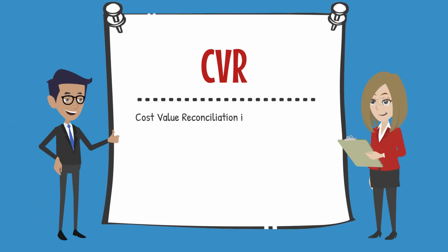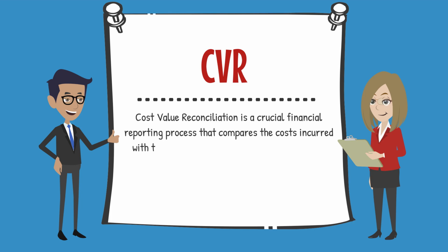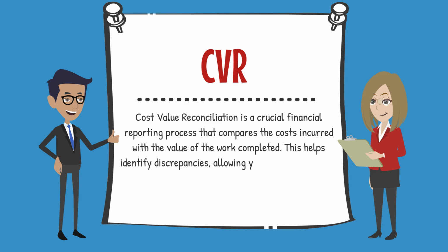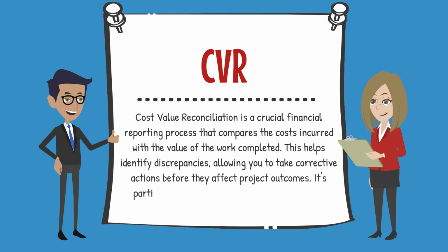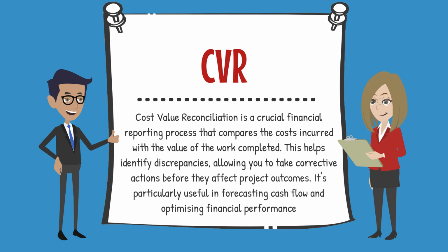Cost value reconciliation is a crucial financial reporting process that compares the cost incurred with the value of work completed. This helps you to identify discrepancies, allowing you to take corrective actions before they affect project outcomes. It's particularly useful in forecasting cash flow and optimizing financial performance.